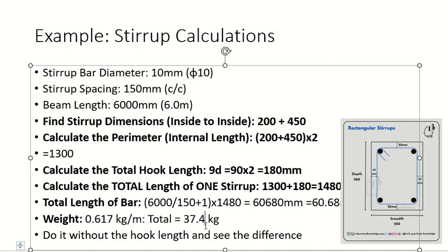Imagine if you make some assumption regarding the main steel. The thing which we were discussing earlier, 100 millimeter to 100 millimeter. If you get confused or assume something between them, you can imagine how much will be the changes in price. So this is how your mistake can cost a lot in the project.